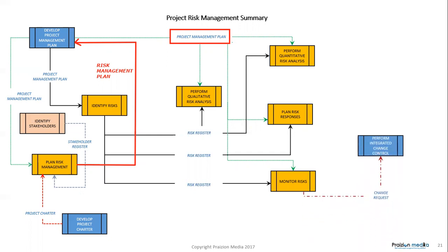We have this feedback loop of change requests coming from monitor risks and going into perform integrated change control, because when you monitor risks, you could have change requests for one thing or another. Those will need to be reviewed.